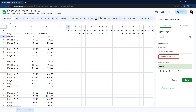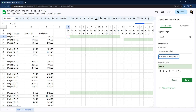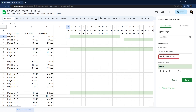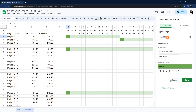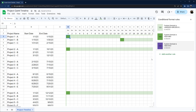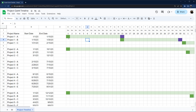Now we're going to do the same thing except looking for less than C3 for the end date. As you can see it's already highlighting — we're missing the first and last day on purpose, but we could use >= and <= to include both. I'm going to add one more rule: a simple IF checking if E equals the start date, colored dark green, and another rule for the end date colored purple. Now you can see the beginning and end are highlighted and the middle has a lighter green.